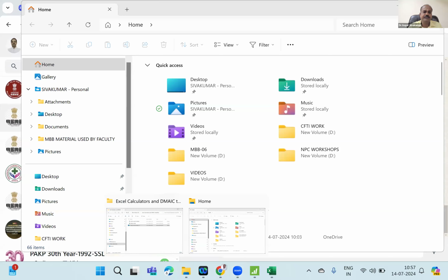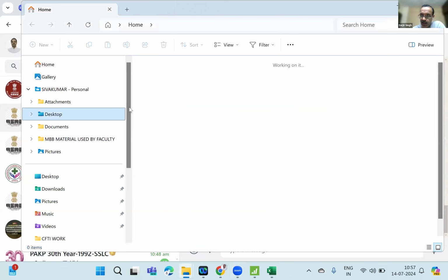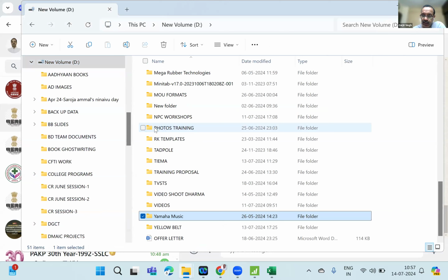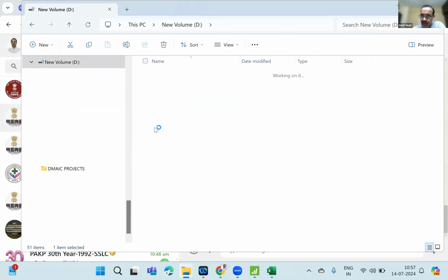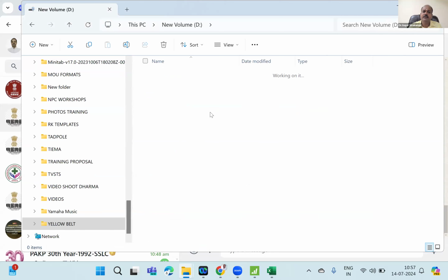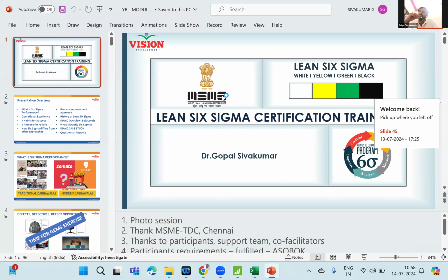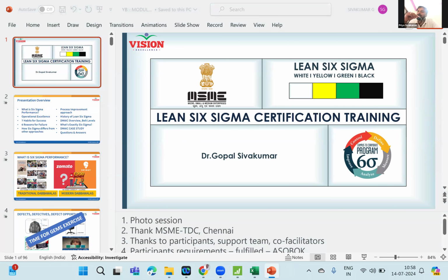So one question I have. Whatever we have defined so far, the information that we captured in the project charter, it's the define phase. Yes, define phase. So I will also show my slides quickly. Please ask your question. Under financial benefit, while deriving cost of quality, which cost do we need to consider here, sir? Either the manufacturing cost or the selling cost? Manufacturing cost only.